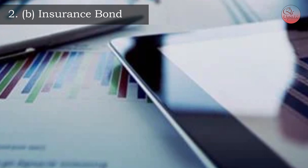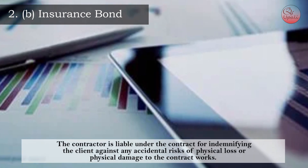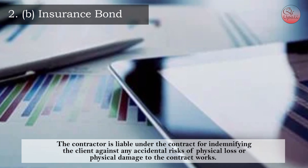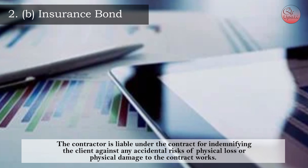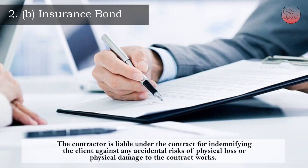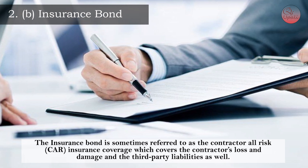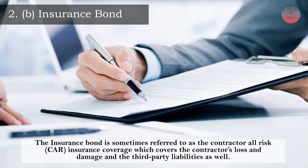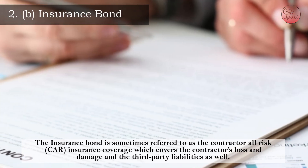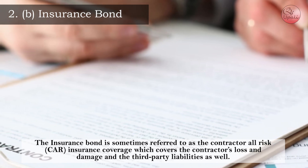B) Insurance Bond. The contractor is liable under the contract for indemnifying the client against any accidental risk of physical loss or physical damage to the contractor's work. The insurance bond is sometimes referred to as the contractor's all-risk (CAR) insurance coverage, which covers the contractor's loss and damage and third-party liabilities as well.